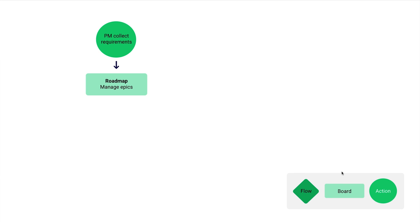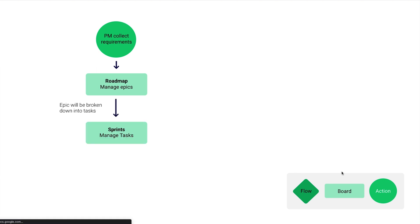Then the product manager together with the dev team lead will break down each epic into tasks. Our software development solution uses a scrum agile methodology, so we have a sprint board.